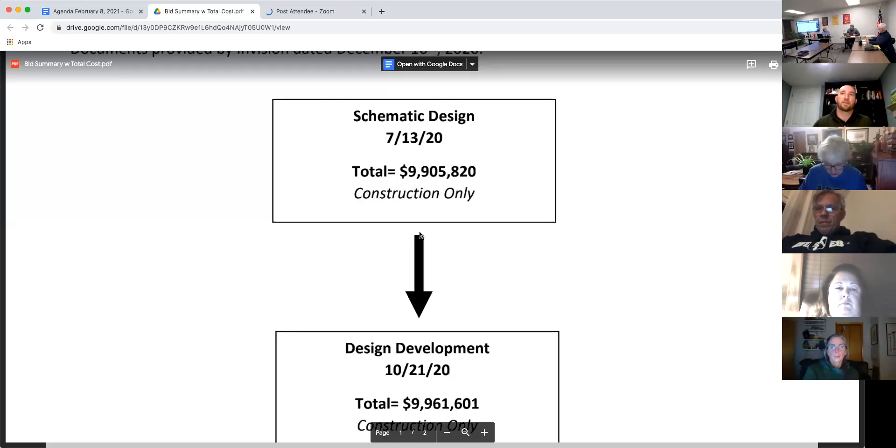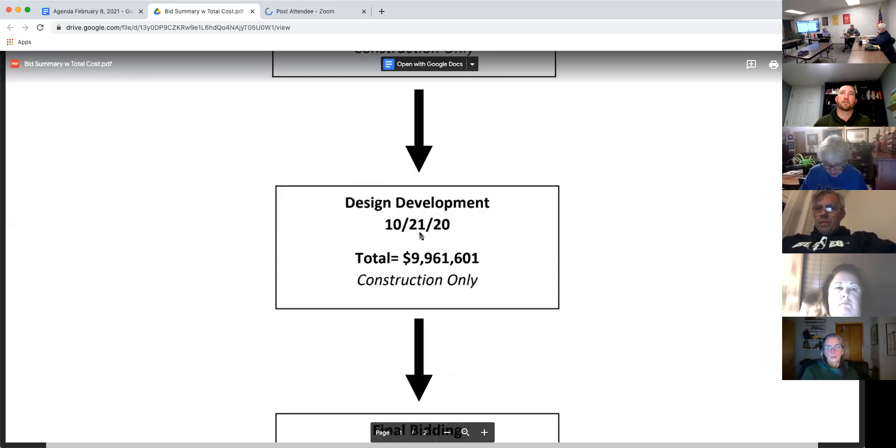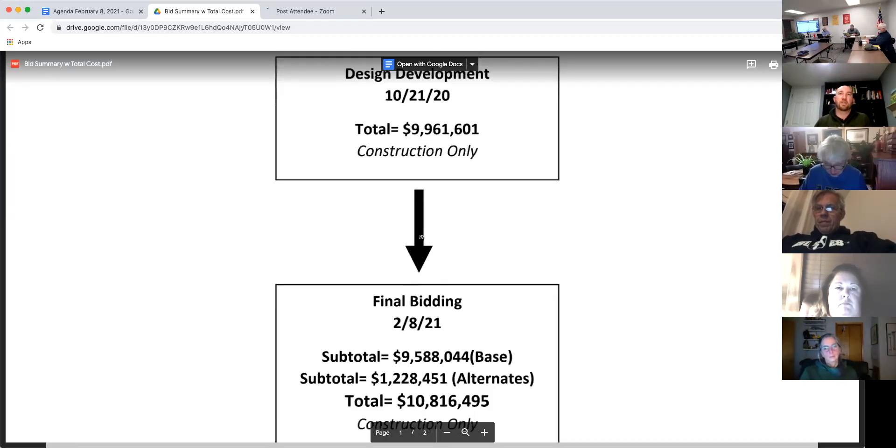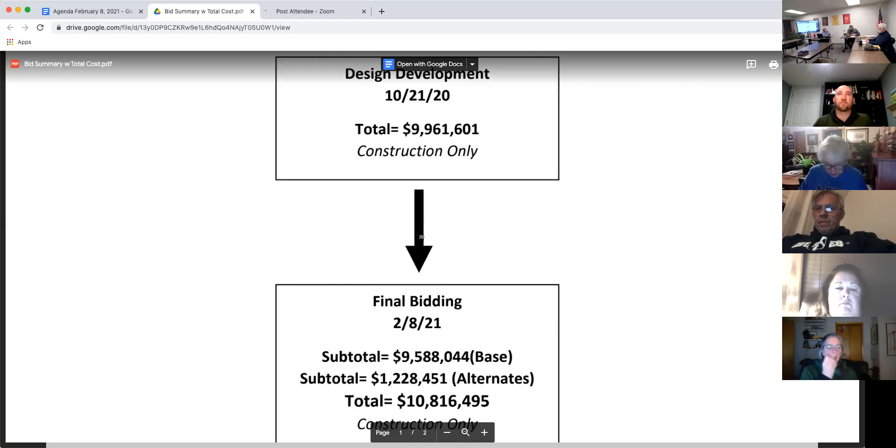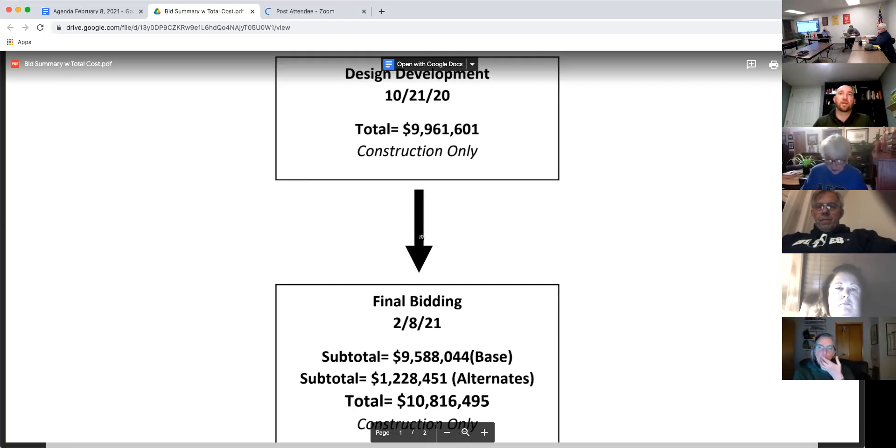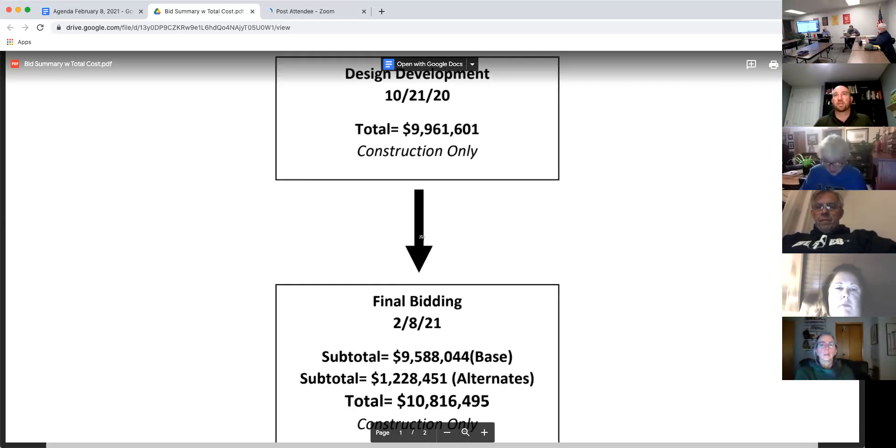And then as of bidding that we did last week, well, I guess we're a week and a half from that now, with all of the base bids considered, we were at $9.588 million. So we did experience some savings on that.